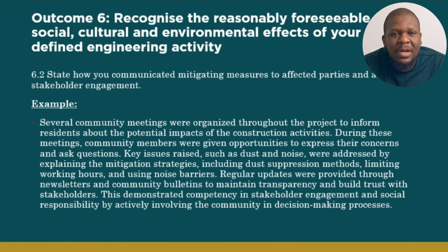Now, let's use an example to demonstrate how we have achieved this outcome. I organized several community meetings throughout the project to inform residents about the potential impact of the construction activity. During these meetings, community members were given the opportunity to express their concerns and ask questions. Key issues raised, such as dust and noise, were addressed by explaining the mitigation strategy, including dust suppression methods, limiting working hours, and the use of noise barriers.